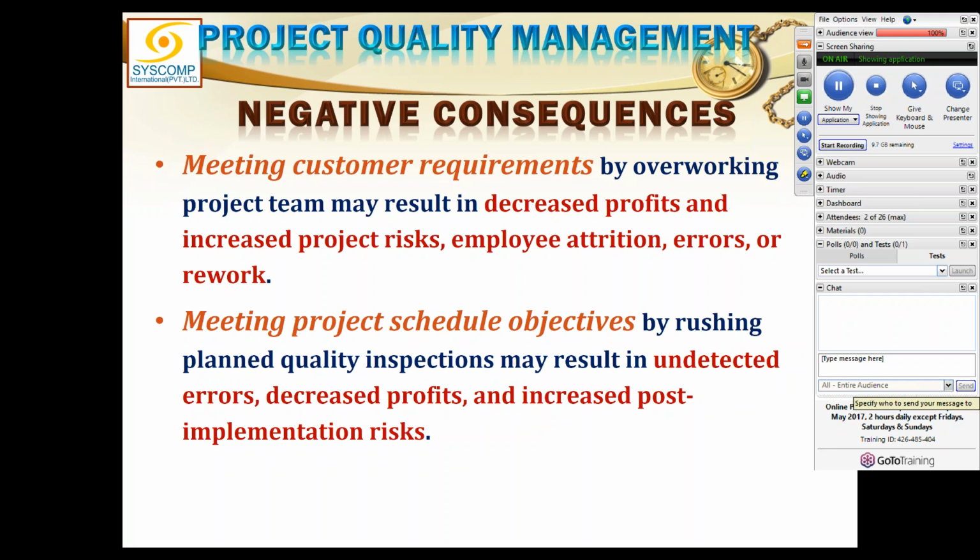When it came actually to the execution of the work, we were given orders from the very top to do it in 6 months. Now, I am not against compressing the project schedule, but compressing it to ridiculous limits can really damage something. We did have all the quality assurance and quality control mechanisms built into the system for this 3-year planning. But when the plan was compressed by 6 times to 6 months, 6 times, can you just imagine?